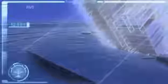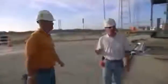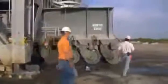The tower sits over the Batcave. If the tower comes down as planned, the weight will collapse the Batcave and destroy it. For a successful demolition, Marc's team will have to relocate the tower. Project manager Kevin Klass has the job of moving the 6,000-ton tower to the end of the launch pad's runway. The tower does have wheels, but there's a problem. No one has used them in 3 years, and they've totally seized up.